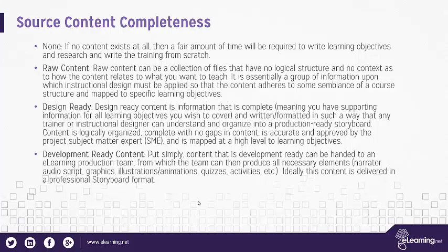we usually look at splitting e-learning projects into two major phases. There's what we call the storyboarding and instructional design phase, and then there's the multimedia development phase. It's almost fully 50% effort on both sides. So if it takes 4 weeks to get your source content in order and ready to go, it's probably going to take 4 weeks to get the multimedia produced as well. It's pretty close to a 50-50 proposition.